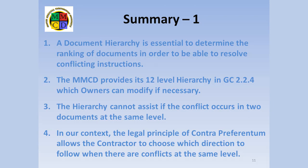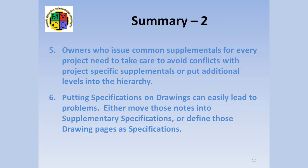Let me summarize the points I've made in this video. 1. A document hierarchy is essential to determine the ranking of documents in order to resolve conflicting instructions. 2. The MMCD provides its 12-level hierarchy in GC 2.2.4, which owners can modify if necessary. 3. The document hierarchy cannot assist if the conflict occurs in two documents at the same level. 4. The legal principle of contra preferentum allows the contractor to choose which direction to follow when there are conflicts at the same level. 5. Owners who issue common supplementals for every project need to take care to avoid conflicts with project-specific supplementals, or put additional levels into the hierarchy. 6. Putting specifications on drawings can easily lead to problems — either move those notes into supplementary specifications or define those drawing pages as specifications.